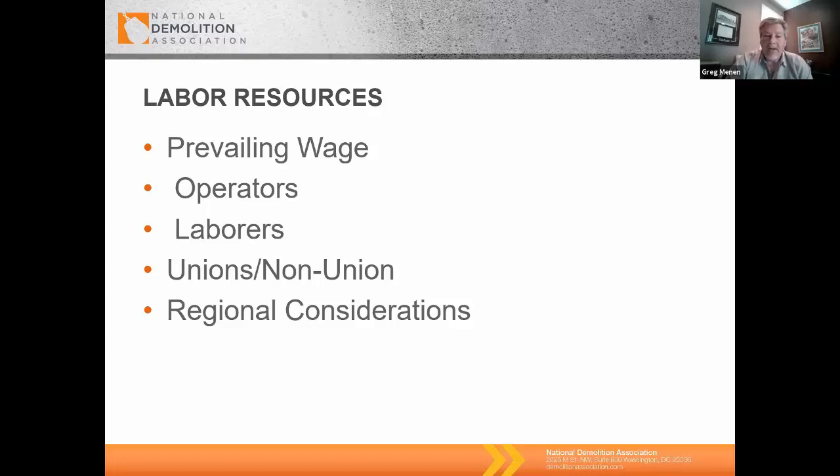If you go there and say, hey, I'm a union contractor, well, you have very specific requirements about how many of your own personnel you can bring and mentor what's there. And the wage difference just for a laborer burdened in like the state of Washington generally is going to run you somewhere close to $45 to $50 an hour, with overtime required after 8 hours and double time required after 10 hours, and then time and a half on Saturdays and double time on Sundays. Whereas if you go to Tennessee or some of the other states, the rates will be considerably cheaper.